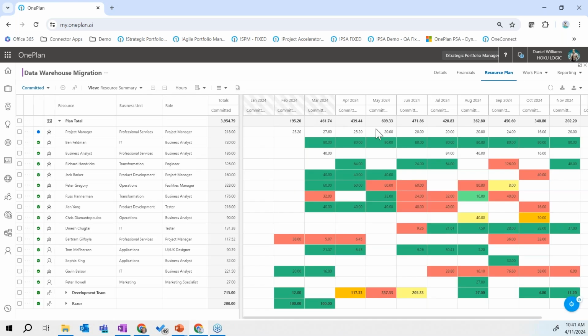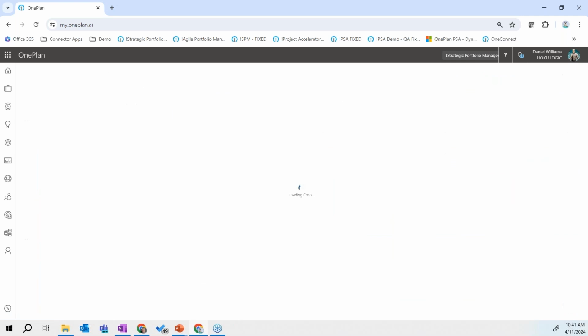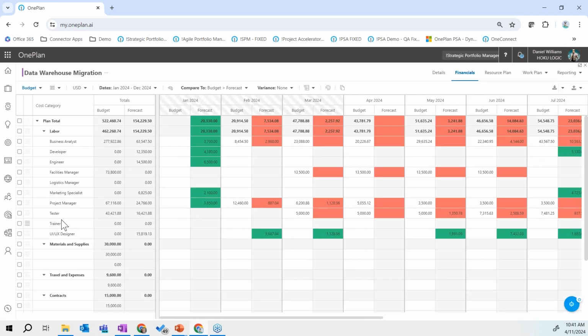We also have the resource capacity component in here that allows us, on this individual project, to determine what resources we need and plan them in hours, FTEs, percentages of allocation, whatever it might be, and have this feed up into an overall resource capacity plan, or even feed into financials from a labor perspective, and then even capture non-labor things in here as well. So once again, those financial components are all in here. And at any given point in time for this project, we can visualize, from a project-centric way, all the things that this project is aligned with.